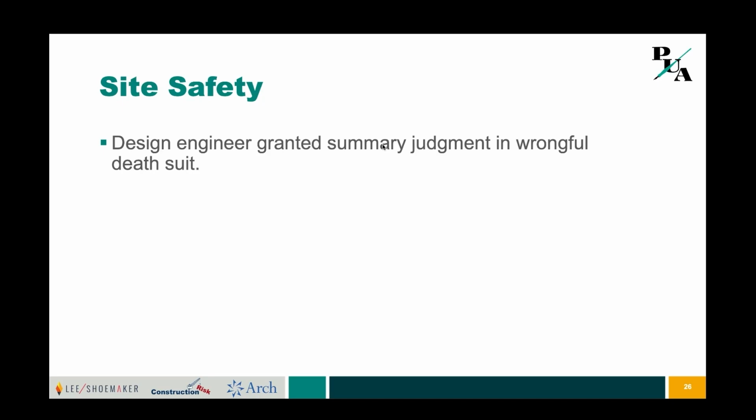This poor engineer who probably got paid next to nothing for this concept design in the grand scheme of things ultimately moved for summary judgment, arguing that hazard assessment and construction fell outside of the scope of their agreement with the owner. And when the court looked at this particular argument by the engineer, they focused on both the engineer's conduct and its contract. And as to its conduct, the trial court found that there was no genuine dispute that the engineer was hired merely to make a schematic concept design of the facility, plan understood by construction professionals not to be a final product, and he didn't have any further involvement on the project.